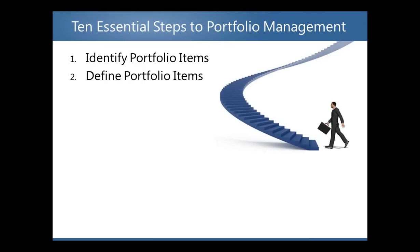Keep in mind that some of the key evaluation metrics we discussed may apply to your organization or may not — this is going to be a step individual to your business. Step three: evaluate portfolio items. Once all your items are entered into the portfolio, it's time to evaluate them. This can be done through a variety of methods. For example, you may leverage a formula for rating your items against each other — determine which item will bring the most value, the least amount of risk, align best with your resources, or provide the best alignment with your organization's objectives. Rating and scoring is a common portfolio management practice. You may also introduce what-if modeling to view various models and conditions.